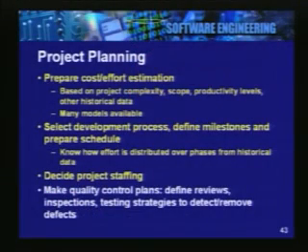In the overall plan, we will schedule reviews and inspections at appropriate points. We will define testing strategies so that we can maintain a control over the defects and we can ensure a quality product from our approach. So, these are the different steps in the preparation of a project plan.